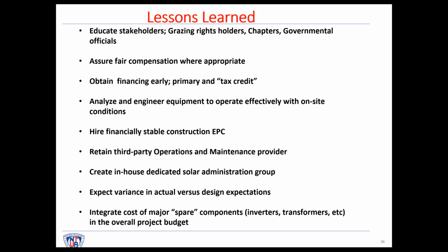As I mentioned earlier, expect variance in actual versus design expectations. Don't set a PPA output expectation on what the design expectation is, because for many reasons that may not be met.